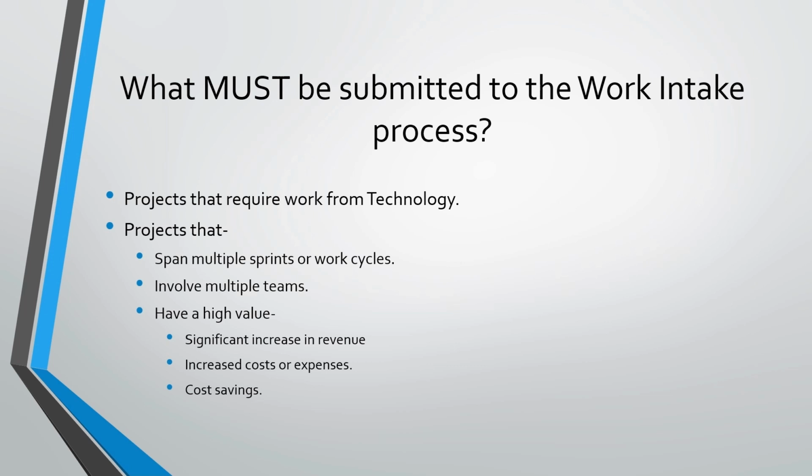Other criteria include projects that span multiple sprints or work cycles, or those projects that you suspect will take a technology team longer than 2 weeks to complete. Projects that involve multiple technology disciplines like SAP and web, or web and commissions, for example. Projects that have a high value, such as the possibility of significant increase in revenue, the possibility of increased costs or expenses, or the possibility of significant cost savings. For any of these high value reasons, a work intake request should be submitted so that it can be brought to the attention of executive management and receive the proper analysis and priority.